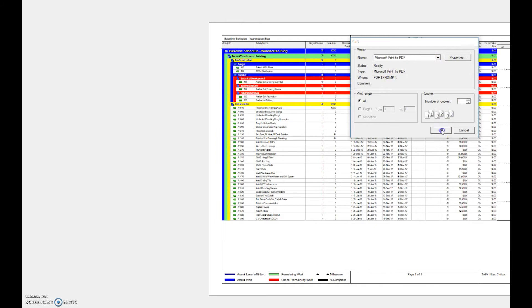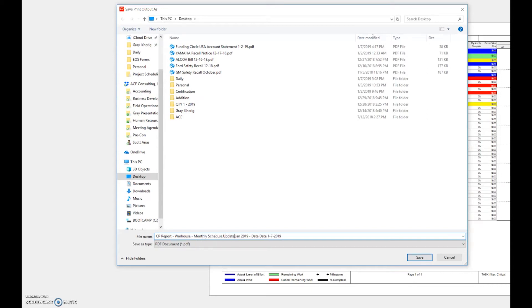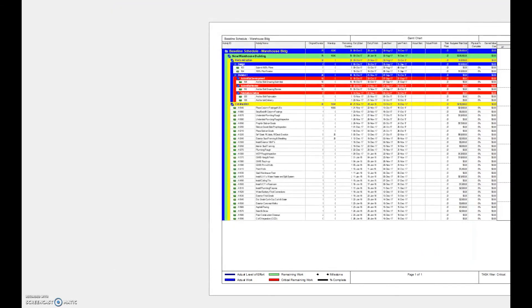Print to PDF and name it — for example, 'Critical Path Report Warehouse' then the data date, such as 1-7-2019 or whatever date you're reporting on. Then you'd add whether it's the recovery schedule or, if it's a schedule update, you'd put something like 'Monthly Schedule Update January 2019.' So you include the report type and the period in the file name.